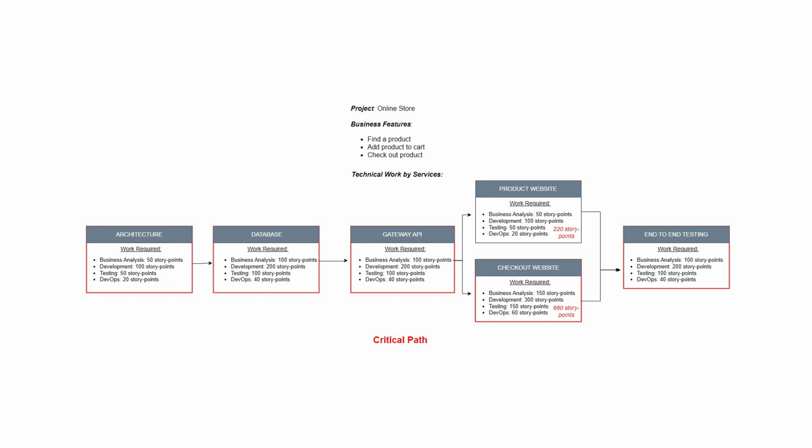Another useful purpose of network diagram is calculating of critical path. Critical path is the longest path in the network. Even if all dependencies are properly paralleled, the project time cannot be less than the critical path time.